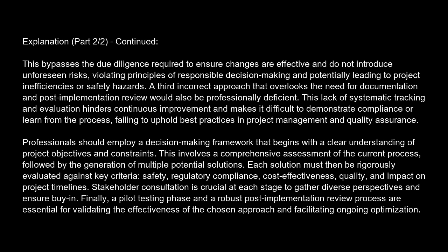Professionals should employ a decision-making framework that begins with a clear understanding of project objectives and constraints. This involves a comprehensive assessment of the current process, followed by the generation of multiple potential solutions. Each solution must then be rigorously evaluated against key criteria: safety, regulatory compliance, cost-effectiveness, quality, and impact on project timelines. Stakeholder consultation is crucial at each stage to gather diverse perspectives and ensure buy-in. Finally, a pilot testing phase and a robust post-implementation review process are essential for validating the effectiveness of the chosen approach and facilitating ongoing optimization.